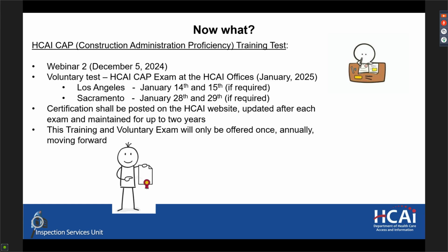So like we'd have a PDF for sheet A200 and then another PDF for sheet A201, and it would always be the latest in that folder. So the old versions of the sheets lived in like a voided folder that we didn't look at. So that way we could always pull up the latest reference drawing to review when we're looking at RFIs or presenting NMAs or ACDs, for instance.